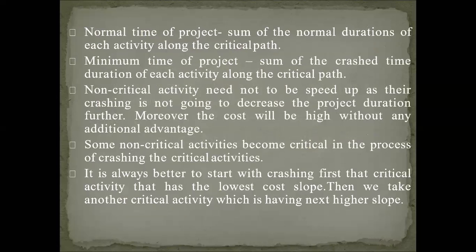The normal time of the project: if it is not given, we have to prepare our own network and find out the normal time of the project. Already we know how to do it. Sum of the normal durations of each activity along the critical path. So we have to find out first the critical path, as critical path is the longest path of the project and it gives us normal time.